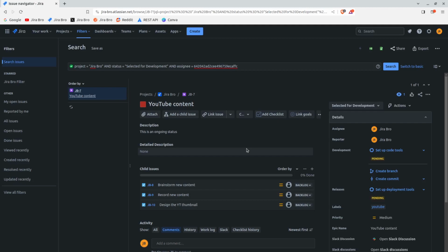So instead of something being done, it could be rejected. But then someone would ask, I want this status to be in the rejected status. Well, actually the status can be created as rejected, but the status category needs to be either from those 3, and possibly it's going to be in the done status category, because there are no more status categories besides those 3.